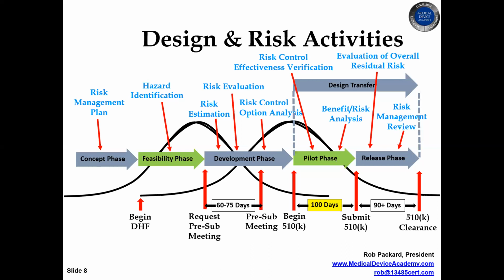In some 510Ks, they actually want, particularly if it's an abbreviated 510K, they may ask for your risk analysis. And they often ask for risk analysis because your device has software. So most software devices have to provide their risk analysis and hazard identification, traceability matrices. So a lot of this information is required for different parts of different submissions. So you can't just say, no, we're going to do that later. It's supposed to be part of the design process.